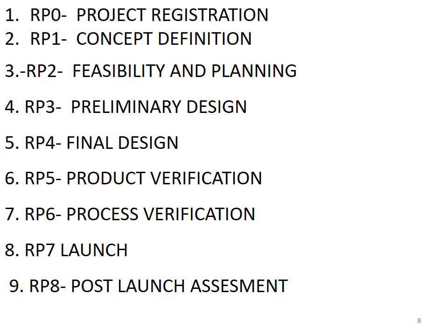Then we go for launching a product in a market. So launch the product, finalize pricing and sales forecast, complete sales and service training, and finalize the product metrics. So what type of models we are going to produce, we have to finalize here. Then last is the post launch assessment. Identify lessons learned, solicit customer feedback and satisfaction rating, measure sales versus forecast.